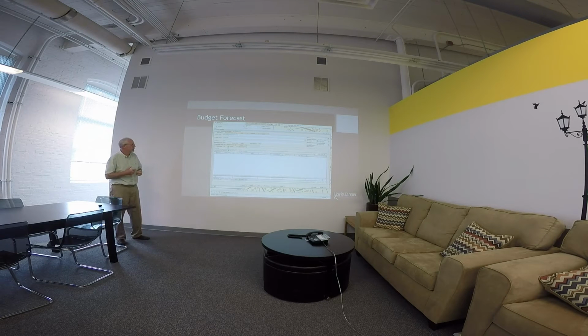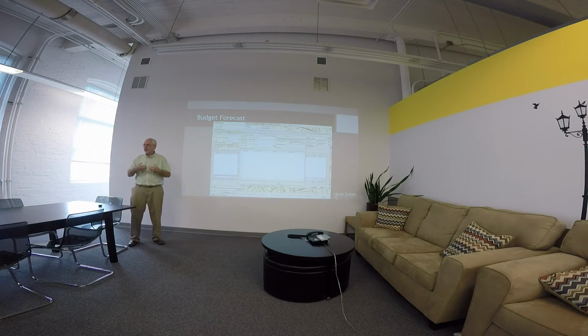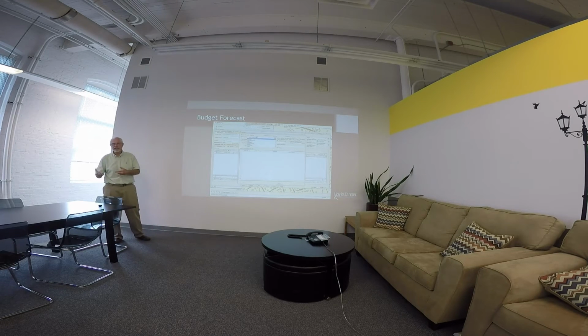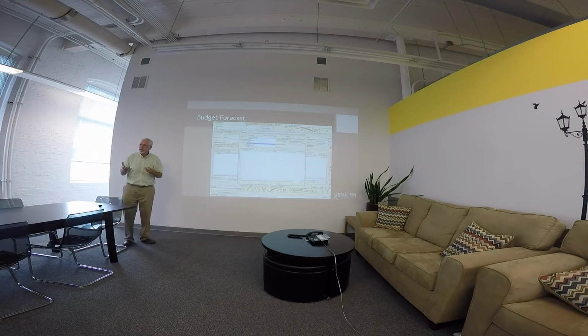Now, when we talked about the tools utilized, the sewer, so when I add a job, the job represents a line item of that cost estimate. With the sewer, I have different options: replace, repair, and seal. I'm going to add a job specifically for the sewer asset class, because it's a capacity issue. But I could add jobs in other asset classes that may be associated with the proper repair, or to replace it by upsizing. My asset type here is sanitary pipe.